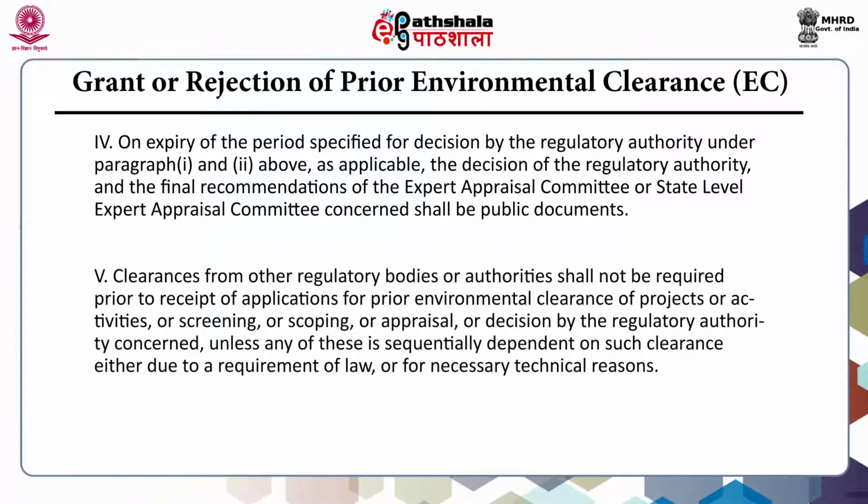Clearance from other regulatory bodies or authorities shall not be required prior to receipt of applications for prior environmental clearance of projects or activities or screening or scoping or appraisal or decision by the regulatory authority concerned, unless any of these is sequentially dependent on such clearance either due to requirement of law or for necessary technical reasons.